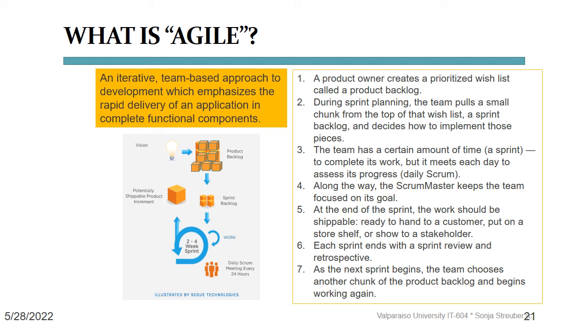So far things don't really seem all that different from traditional activity duration estimates, right? But then the magic happens. Then the team, in collaboration with the product owner, determines, based on the priority and their estimates, how many of these user stories can be developed in a 2 to 4 week sprint and deliver a workable product. These selected user stories then go into the sprint backlog.